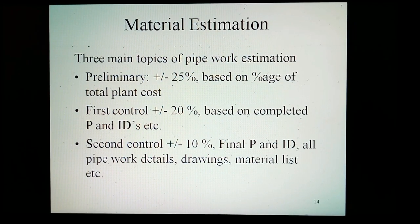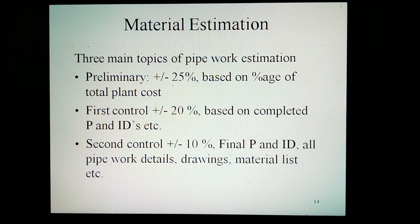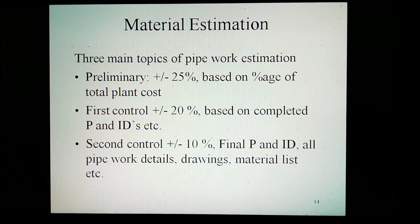Material estimation. There are three main types of pipe work estimation. Preliminary: plus or minus 25%, based on percentage of total plant cost. First control: plus or minus 20%, based on completed P&ID, etc. Second control: plus or minus 10%, based on final P&ID, all pipe work details, drawings, material list, etc.